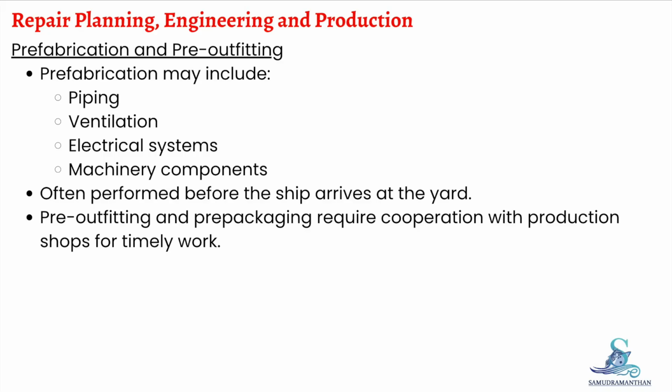In many cases, prefabrication of piping, ventilation, electrical systems, and other machinery is performed even before the ship arrives at the shipyard. Pre-outfitting and pre-packaging of repair units also requires cooperation with production shops to perform the work on time.